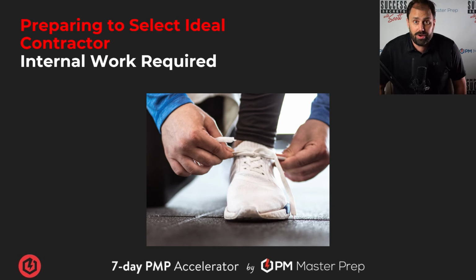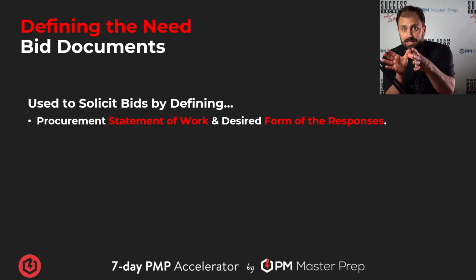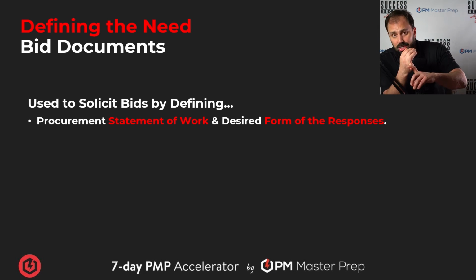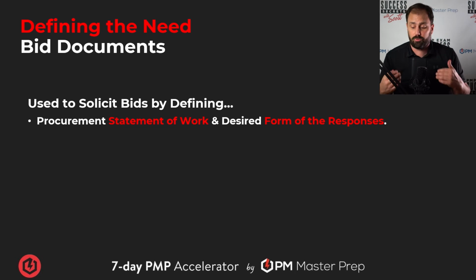And then preparing ourselves, we've got to do a little bit of upfront work inside before we go out there and say, I basically know what I want. No, got to be disciplined. We know we want to get these things done on the outside. Make some bid documents. What are we going to go out there and have them evaluate? We've got to be very detailed. So to solicit bids, bring them in, we've got to define the strategy and the statement of work. What are they bidding on? And define the desired form of response. What do we want to know from them? What's the form of response, etc.